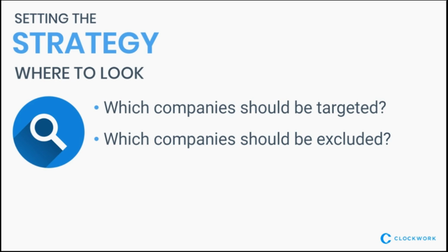I didn't ask the question. The company list that I presented to him for the review and sign off, this was the first company on the list. However, even though it was on the list, client's always right, and I had to backpedal on that one gently. I didn't ask the question up front in the kickoff, are there any companies that should be excluded?